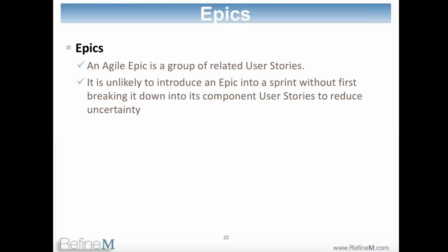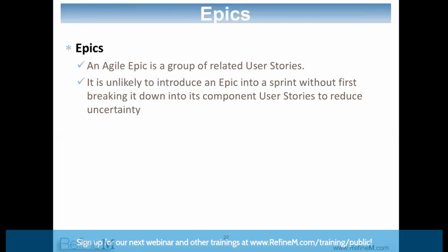But many times, the developers or the product owners or the business analysts are not able to break larger stories into smaller ones, and those larger stories take multiple sprints. So that actually becomes an epic. So an epic is a group of related stories, and it is a much bigger user story, you can call it, and that can be implemented over multiple sprints. So you will not introduce an epic into a sprint. You will introduce only user stories in sprints, because that's what the development team is supposed to be taking and finishing. So an epic is a much larger thing. It may contain 2, 3, 5, 10, 20 user stories, which can be taken up in different sprints. An epic usually may take 2, 3, 4, 5, 6 sprints, even more, but a user story needs to finish within a sprint. So that's the distinction.